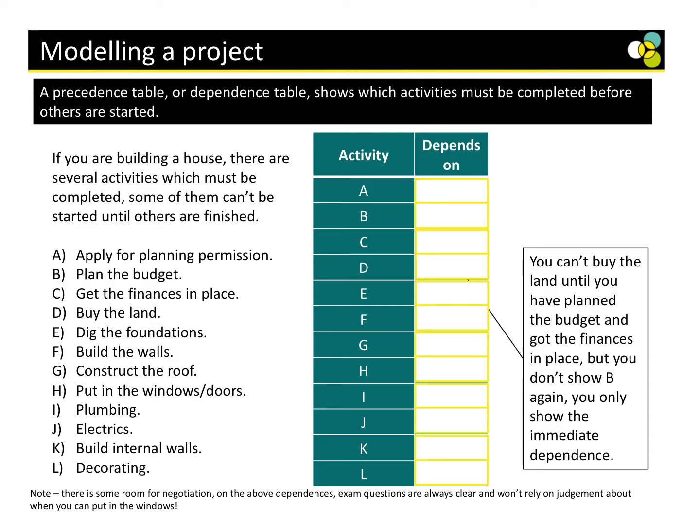Right, okay, we ready? Yeah? Hello? Oh yeah, we're back on. Right, so apply for planning permission. Does that depend on anything? No. So what we do is we write a little dash, because it doesn't depend on anything.